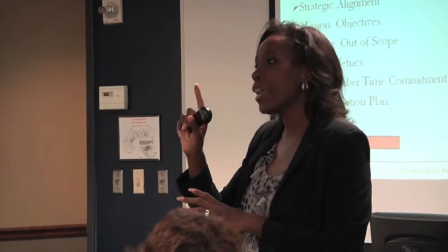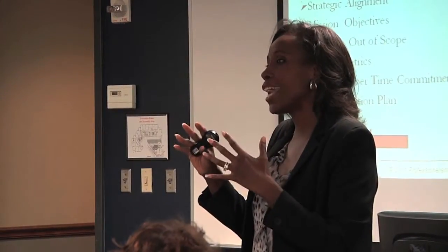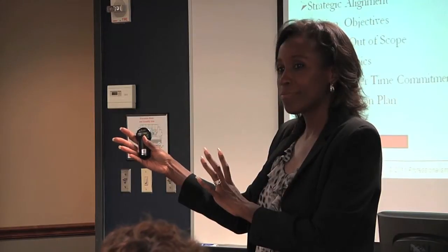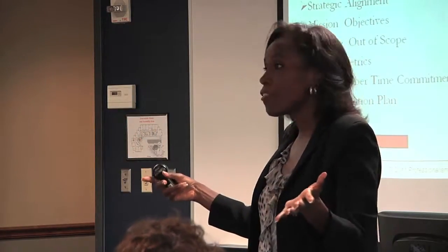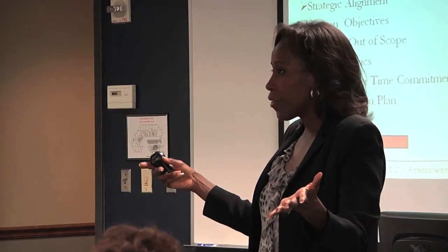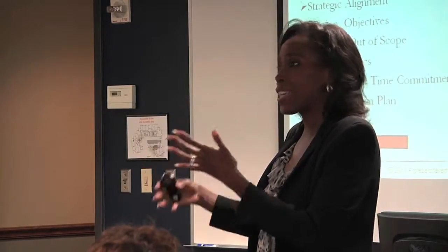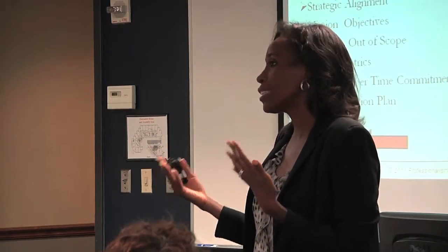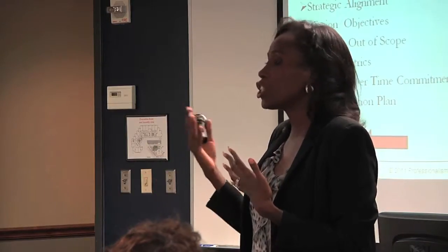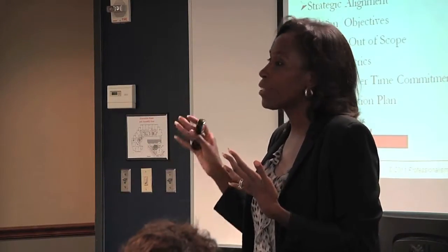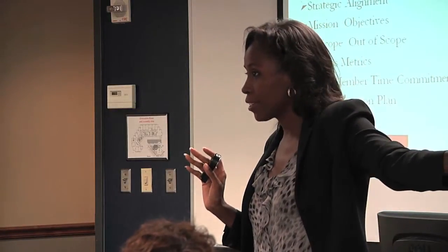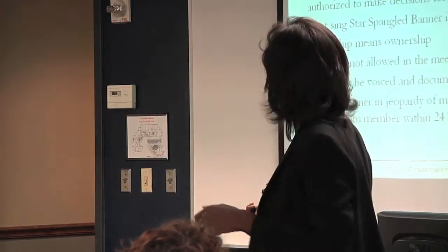And to that point, when your team composition changes, what happens to your team charter, do you think? Yeah, it should be revisited and updated. They're not necessarily bound by that. They didn't participate in that commitment process, so we really need to revisit it and see if it still works. It should be a living, dynamic document. It's not like, oh, we did that in May, that's over with. Okay? So constantly revisit.